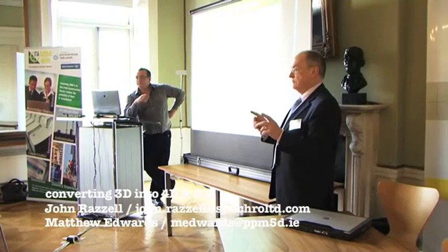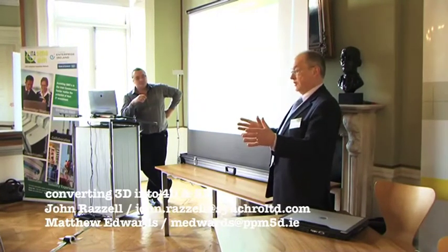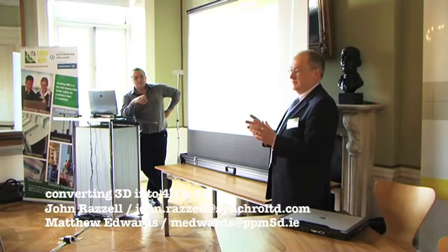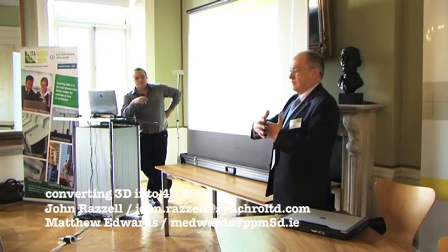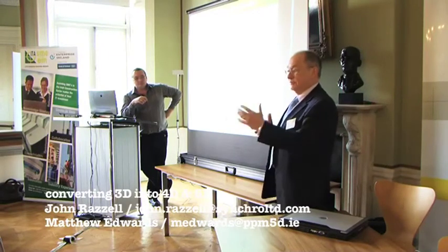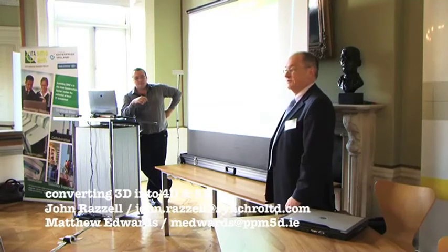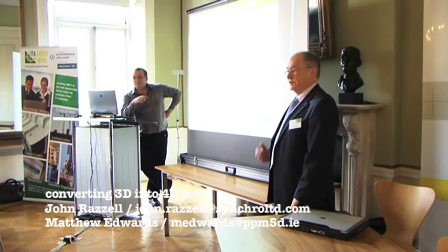Who uses Primavera here? I think a lot of you realise if you've got a copy of Primavera and you copy that project, it changes certain files in there. So it then becomes separate. So you have to make sure you're always linking with the master one, otherwise it can screw up because of the way Primavera works. Just make sure you've got connectivity.